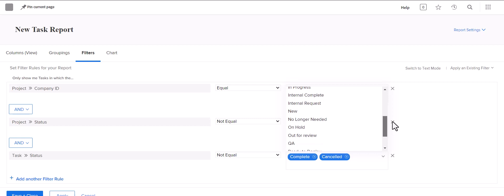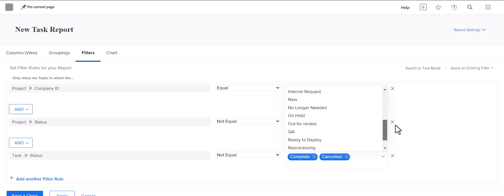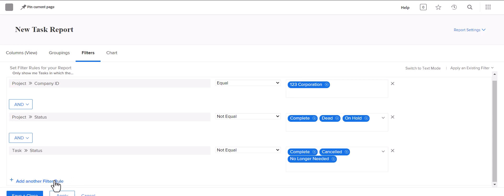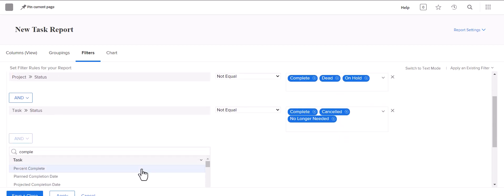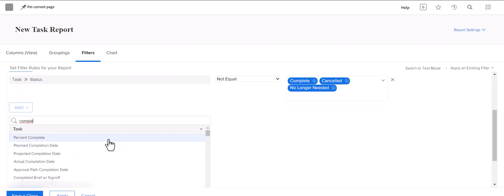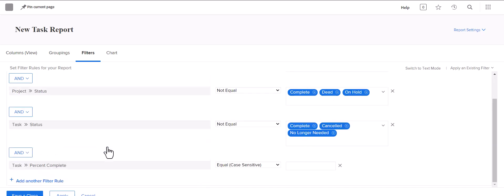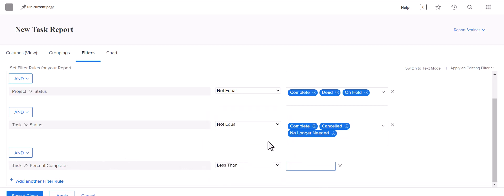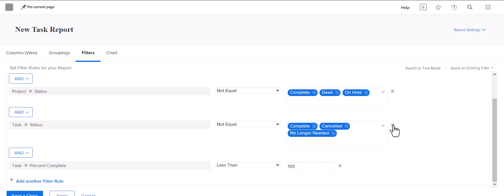That way you're going to pull in everything that isn't completely closed out. Even if you have something like 'no longer needed' in your instance, that'll probably show as closed. Another option would be to go with task percent complete, which might even be easier. If you select task percent complete and go with 'is less than 100,' that will catch everything that's open, regardless of status, because it has not been fully marked complete. So we'll go with that filter.